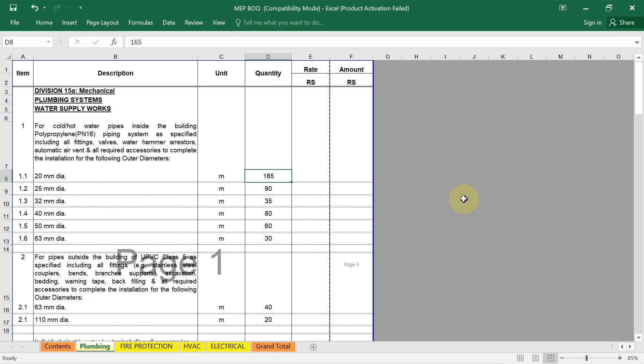The next step is to quantify each item. You have to use the appropriate unit of measurement for each item, example meter, pieces, sets. Then perform the quantity takeoff from the drawings and specifications which I have already discussed. The next step is important: rate and pricing. You have to determine the unit rate for each item based on market price, supplier quotes and historical data. Finally, we have to calculate the total cost for each item by multiplying the quantity by the unit rate.